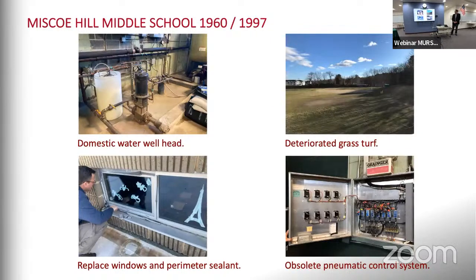So that's something that certainly could be improved upon, but it would be necessary to drill a new well outside of the building. We really don't want the well to be inside of that room where it could potentially be contaminated by oil leaks, fluids. There's a lot of other equipment in that room that really should not coexist with that well.